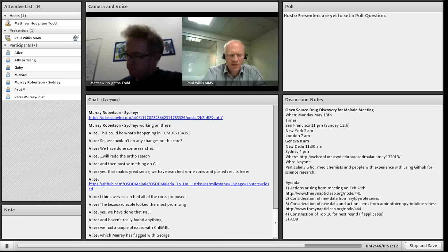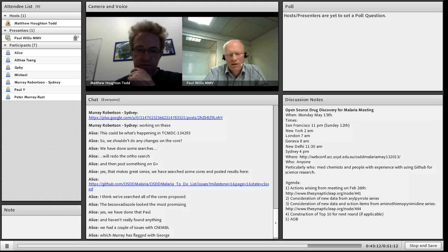So I could send the suggestions in, and then it might be worth thinking of a way of widely publicising that list, so we tap into as wide a set as possible, just to get an online debate and agreement going. We could set a deadline for that. We post our suggested 10 in the next week, then give a week for people to give feedback, and then review those comments and agree that in 2 weeks' time we'll lock a list of 10, and then seek people who can help support those syntheses.